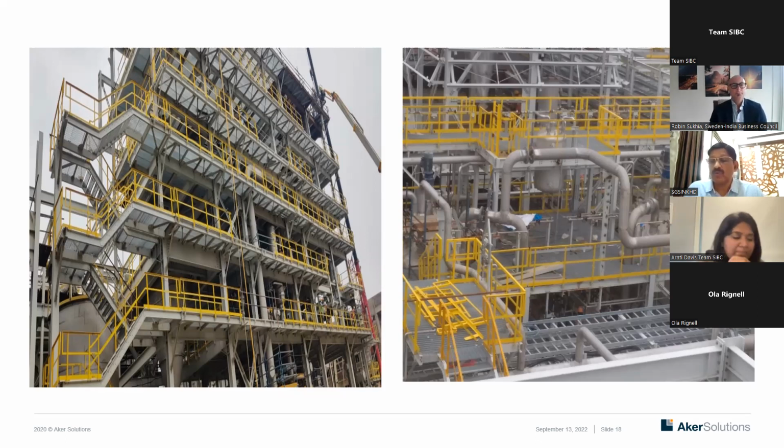And we found that before forming this PCPIR region, the government had one of the engineering companies do a study for the formation. They came out with some data. We used that data and the present system, and this company advised us. Based upon that, our ground level is about 200 mm higher than the road level, and from there each equipment level is another 450 mm higher. The groundbreaking was 2019, and this is 2022. So in 2020, 21, 22, three rainy seasons have passed. Our site is not flooded, but outside we can see flooding.